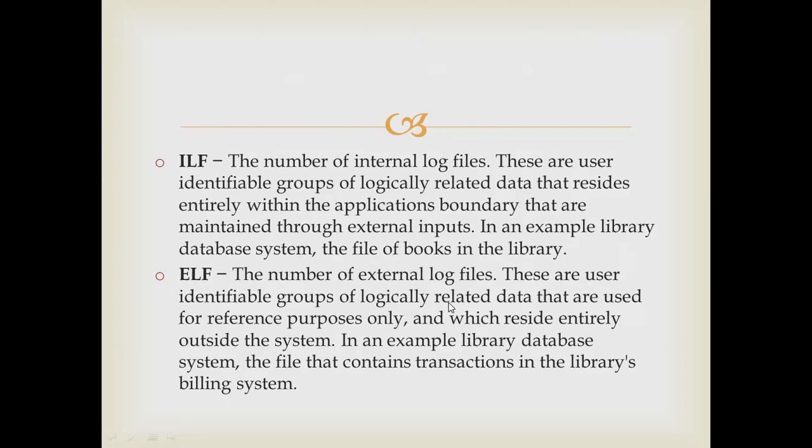Next is external log files. The number of external log files: these are the user-identifiable group of logically related data that are used for reference purposes only and which reside entirely outside the system. For example, the transaction of the library billing system. This is going to be outside the system. No book is being checked in, no book is being checked out, and there is no list of books. It's just a bill, an invoice, which is being generated for the patron, for a person. This is a logical group which is actually used.